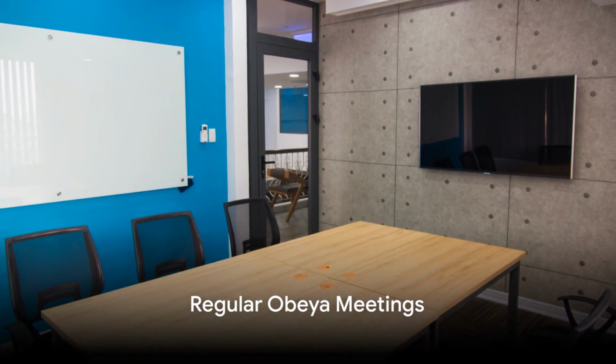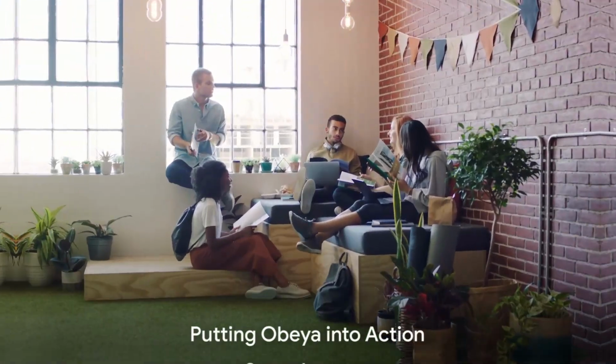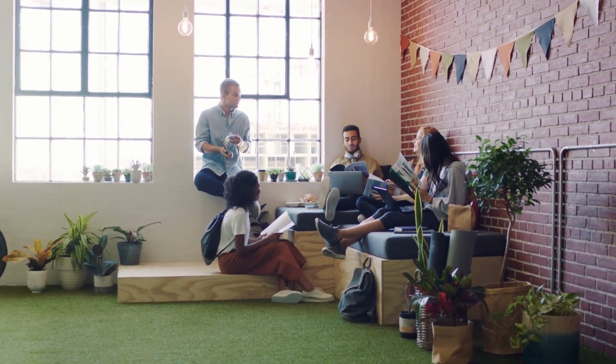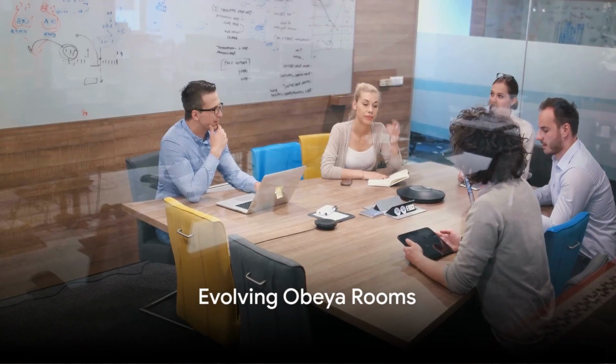Regular Obeya meetings are key, daily for fast-paced projects, weekly or monthly for others. Stick to the schedule. It's time to put your Obeya to work. Facilitate active problem-solving, update information in real time, and track your progress. Obeya Rooms are living spaces that evolve with your needs.